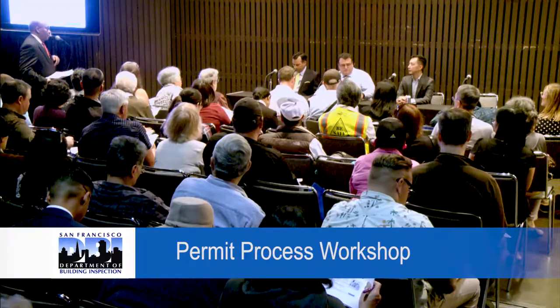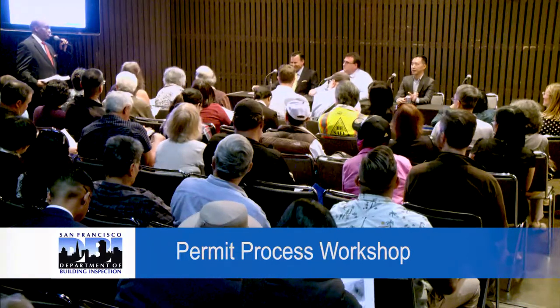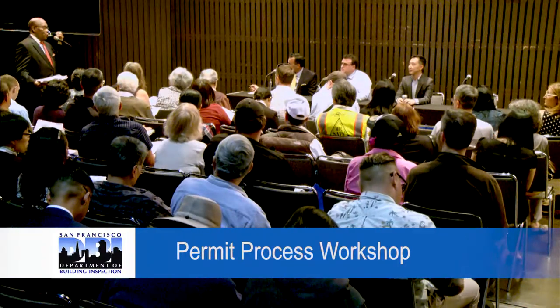Thank you, gentlemen. DBI is, first of all, customer friendly. We're here to serve the public. And the most important advice I can give, besides what Joe said so eloquently, is the over-the-counter process works. You come in with your plans. If it's an over-the-counter project, it's less than 1 hour per discipline, not for the whole project. 1 hour for mechanical, 1 hour for electrical, 1 hour for structural. So that's really 3 hours. So we can get a lot of things done, and we can get your plans over the counter.